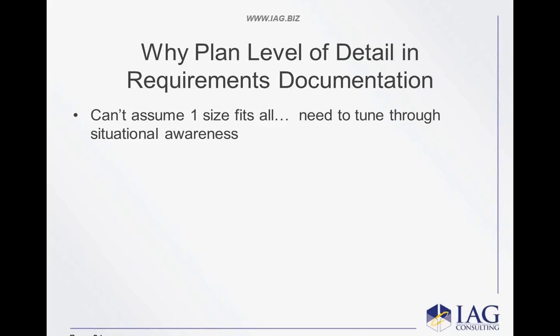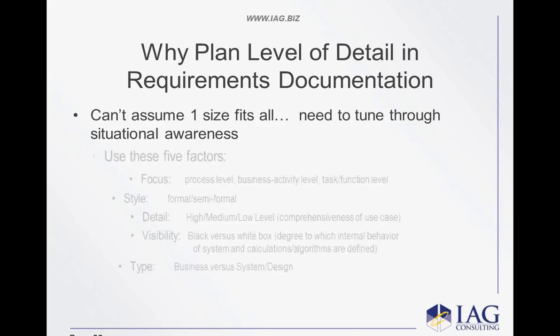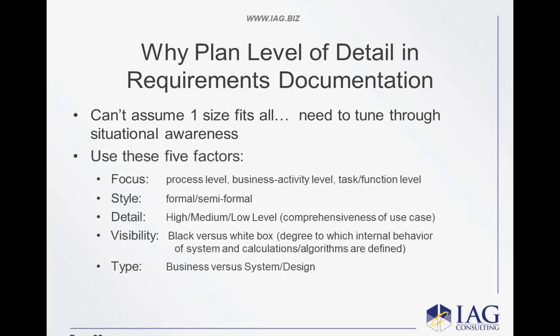Why plan the level of detail in requirements documentation? There's a couple of reasons for this, and this is going to help you project managers out there and analysts, okay? You can't assume one size fits all. So if you're doing a COTS kind of implementation, you need to think that the level of detail and fidelity you need is lower than that. You don't need as much detail as, say, if you're going to do a design build offshore, that type of thing. So you've got to step back and say, there are certain factors that you want to consider.